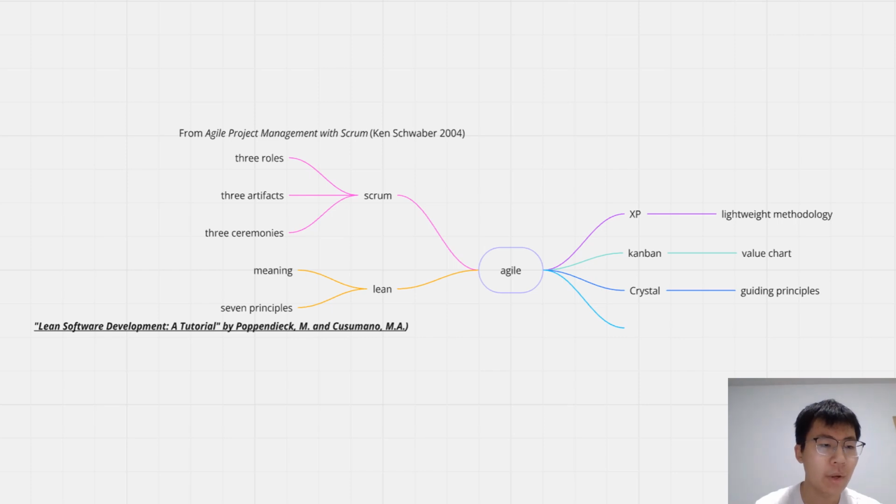The key to a Kanban system is that work in any column is limited. This means that within any value-adding activity, there is a limited amount of work. Moreover, the entire system contains a limited amount of work. And the last model, Crystal.